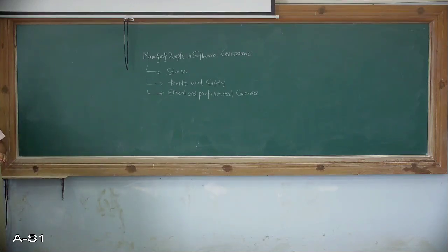As per one American project manager, once a project gets rolling, you should expect the members to put in at least 60 hours a week. And the project leader should put in as many hours as possible. Fine. So there is some pressure on health, and on your families also, and it can be released in different formats. There is good evidence that productivity and quality of output go down when more than about 40 hours a week are worked.